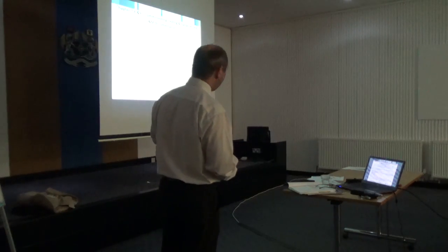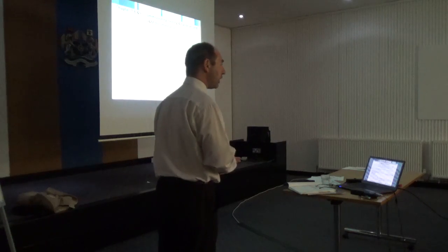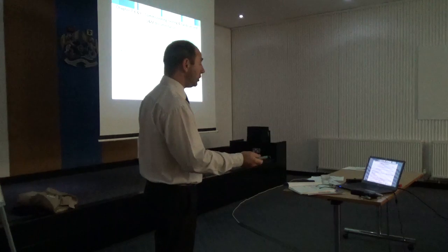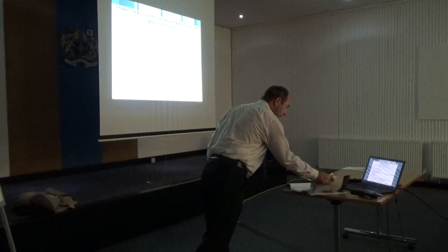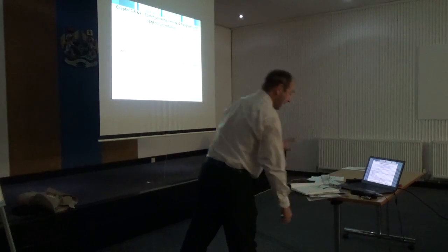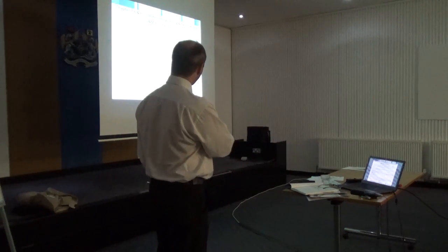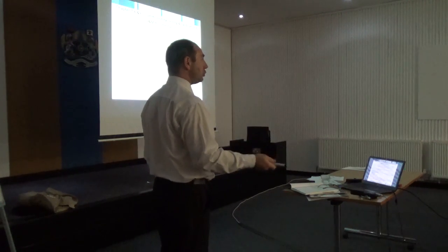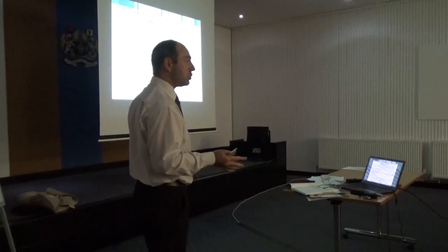So what Guide M again tries to do is say it's important to allow adequate time. Obviously the early engagement with the FM or the operator at the front end will help the designer and the constructor allow the programme accordingly. Importantly, post-completion testing and fine-tuning. You've all heard of soft landings. That's now taking increased pace; I think I've got a little booklet here on it. Yes, government soft landings, you may have seen that. If you haven't, it's freely downloadable off BISRIA's website. But again, grabbed hold of by the government, it's something we're not going to get away from. And actually for FMs that's really good, because there's arguably a 3-year period of aftercare provided by the designer for making sure that the building does what it should do. So it's the Ronseal test: does it do what it says on the tin? Seasonal commissioning, regional recommissioning and continuous commissioning are phrases that you may or may not have heard.